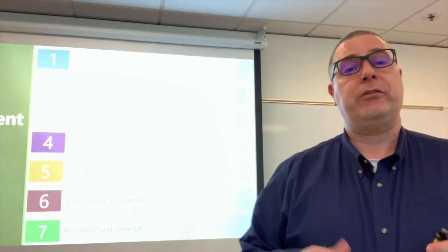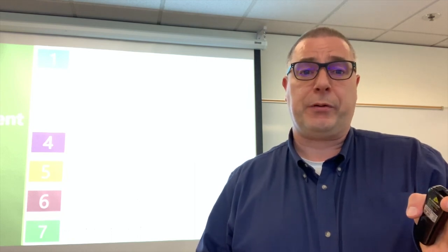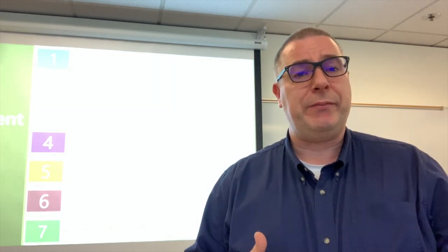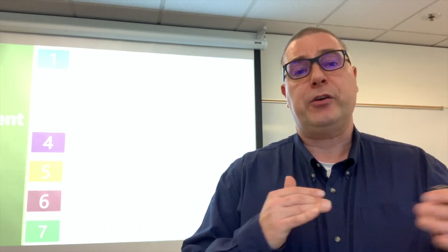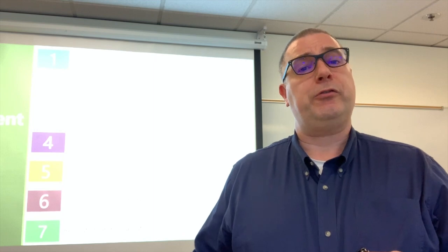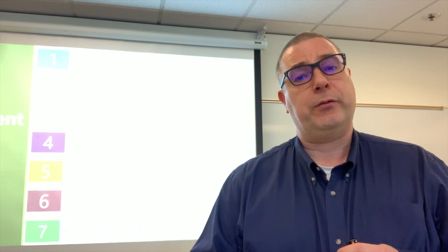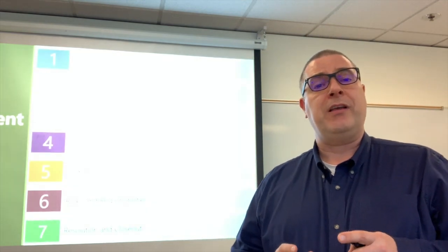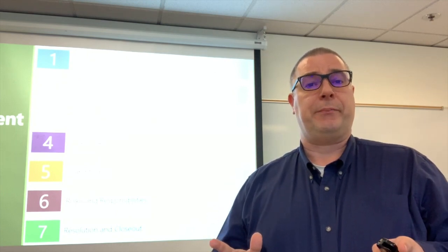And then finally, the resolution closeout. How do you close out an issue? Well, again, an issue is something that's occurring on the project. So how do you close that out? That's really going to be about closing it off, what emails, what notifications have to be sent out, who needs to be involved. And so you're going to document that issue resolution and closure. So I think that's a key component and something that you've got to get documented as well. So these are the 7 components that I build in every issue management plan, and I strongly suggest you get those set up as well.